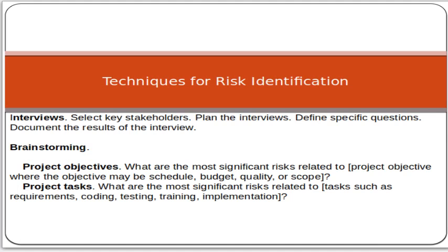Now, techniques for risk identification. The very common techniques for risk identification. First of all, interviews. Interviews means that you select the key stakeholders like the technical leads and functional managers, plan an interview with them, discuss specific questions, and document the results of the interview.